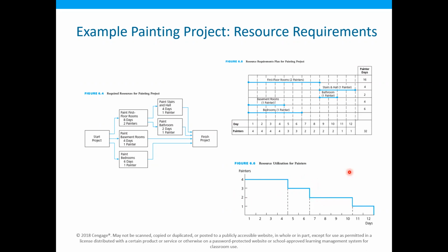So that will clearly be a more fluctuating use of the resources. When there is fluctuating use of the resources, sometimes we need to hire resources, and sometimes we need to fire some of them.